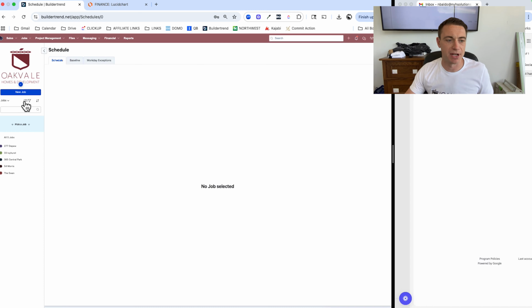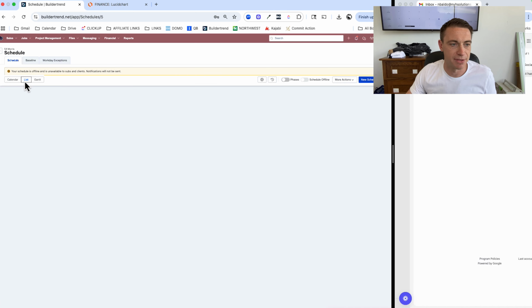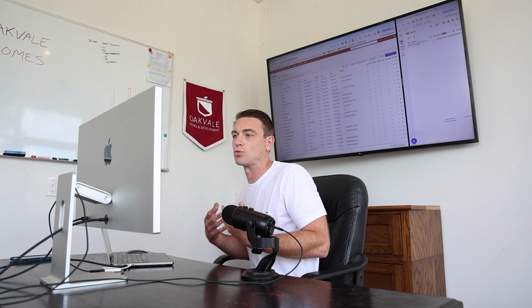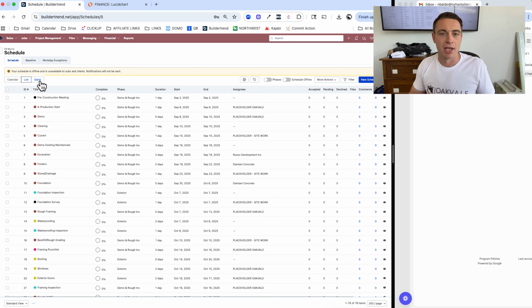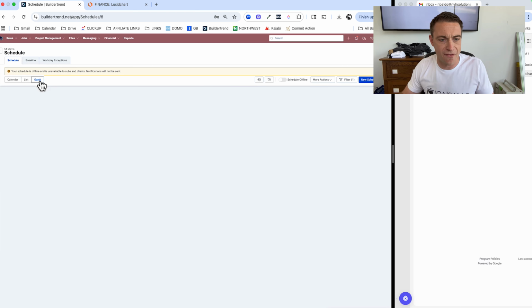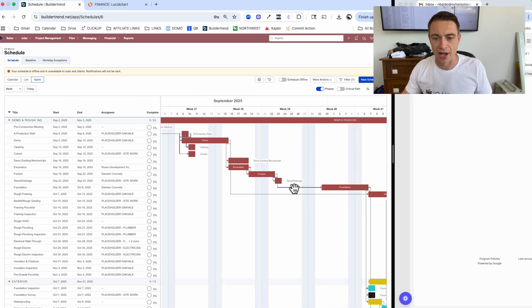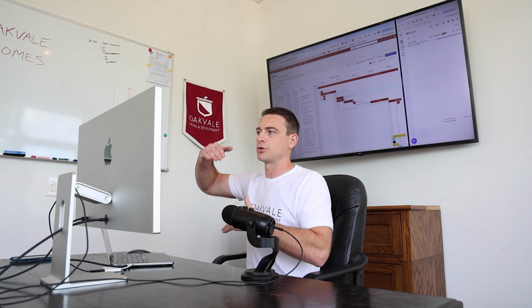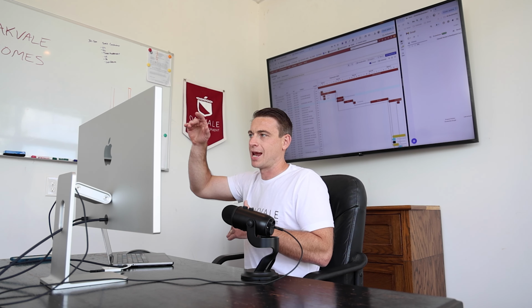The first thing that should have happened is certainly our schedule, right? This is the biggest time-saving piece of the entire thing, is my schedule is going to get in here. Now, when I say we should have one template, here is why I think that's a good idea. What I'm showing here on the schedule is a very comprehensive schedule that shows a bunch of stuff that may or may not be relevant to my job. For example, we've got clearing, culvert, excavation, footers. You might remember I set this up as a kitchen project. The kitchen doesn't have those aspects, right? So those aren't relevant.